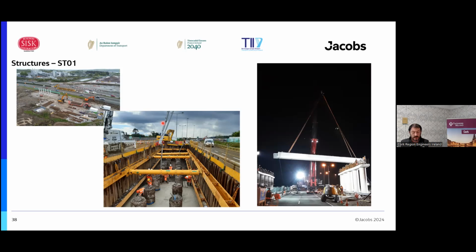And basically infill that again with 804 very quickly and give it a light tamp with an excavator-mounted vibrating plate. And then when we set up with our leader rig, we knew we had our path through the made ground cleared, no obstructions, to get the sheet piles in a good line. And the tolerances we had on each side with traffic, we couldn't afford any variances.